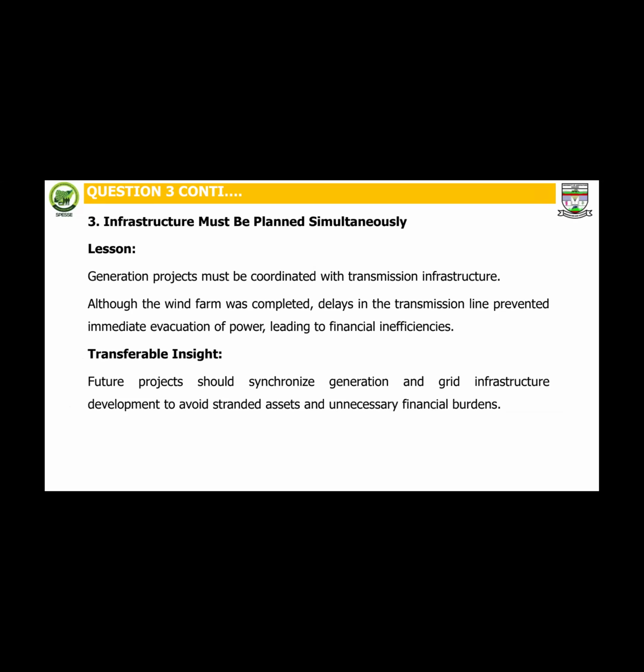Transferable insights: future projects should synchronize generation and grid infrastructure development to avoid stranded assets and unnecessary financial burdens.